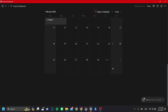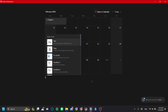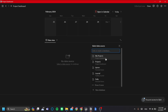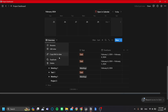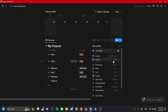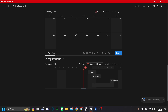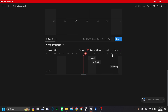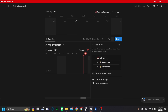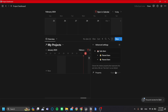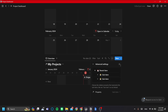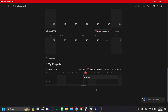Let's add the timeline view. Same thing — press forward slash, click 'View', and select 'Timeline View'. Go to My Projects and click it. Let's change this view's layout to Timeline. Rather than showing tasks, the timeline view is better for showing your projects. Let's switch the sub-items to show the parent item. Now we have our projects listed in the timeline view. Let's rename this view to 'Timeline'.